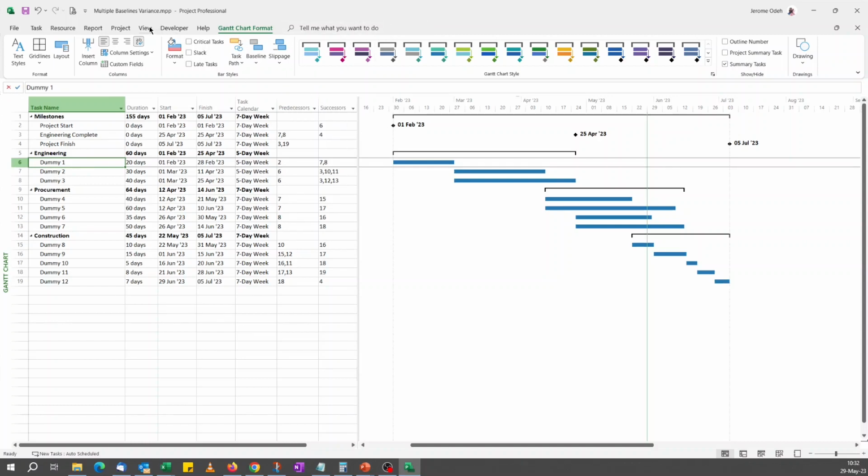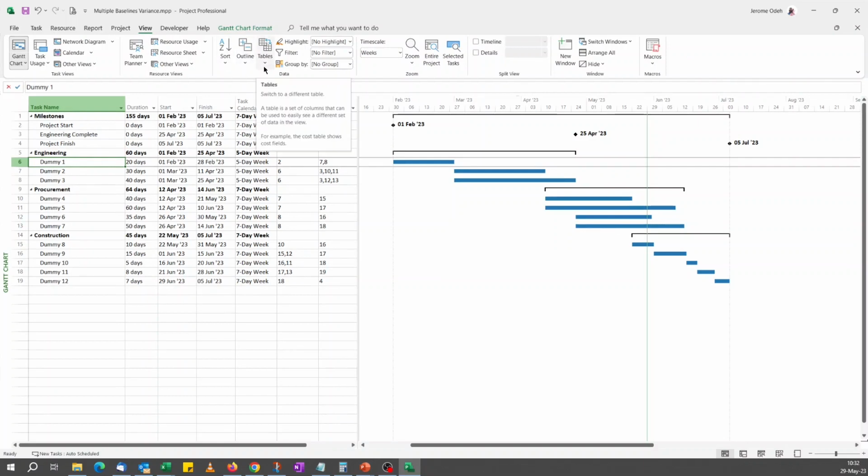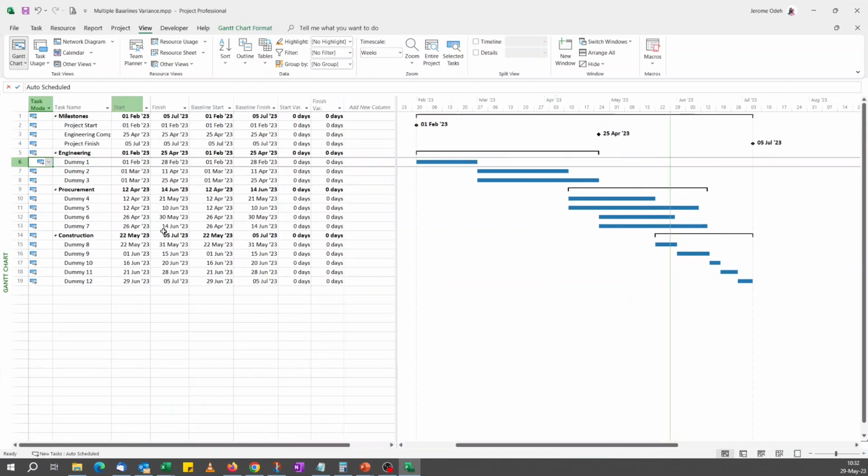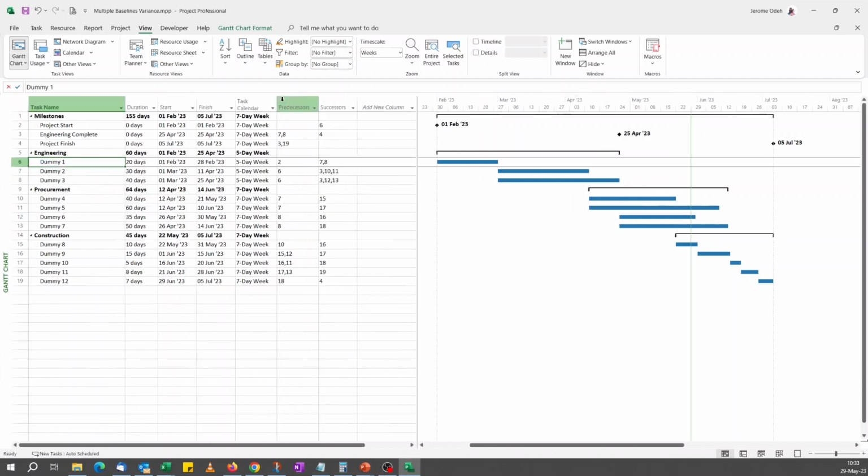You can confirm that by going to the table for variance, which Microsoft Project has got, which will show the baseline information. If you click on that variance table, you see it's showing us your start fields, finish, baseline start, baseline finish, start variance, everything is zero, finish variance, everything is zero. Okay, if we go back to our entry table, now that we've saved the baseline,